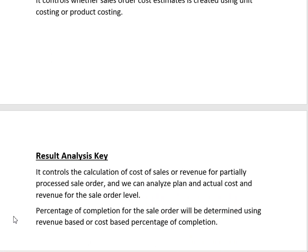The result analysis key controls the calculation of cost of sales or revenue for partially processed sale orders, and we can analyze plan and actual costs and revenues at the sale order level. First we determine the percentage of completion, and then calculate the actual costs and revenues. Percentage of completion calculation has two basic methods: cost-based percentage of completion and revenue-based completion. In the cost-based method, we check how much the total planned cost will be and how much cost has been consumed so far.